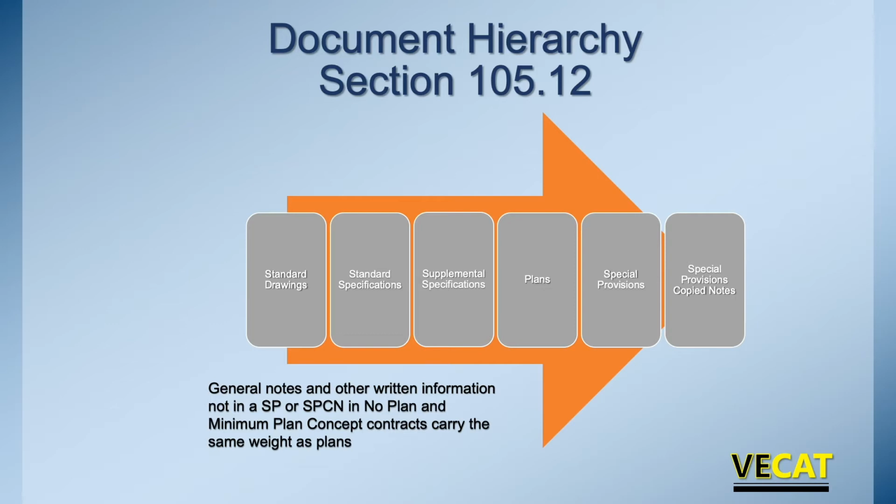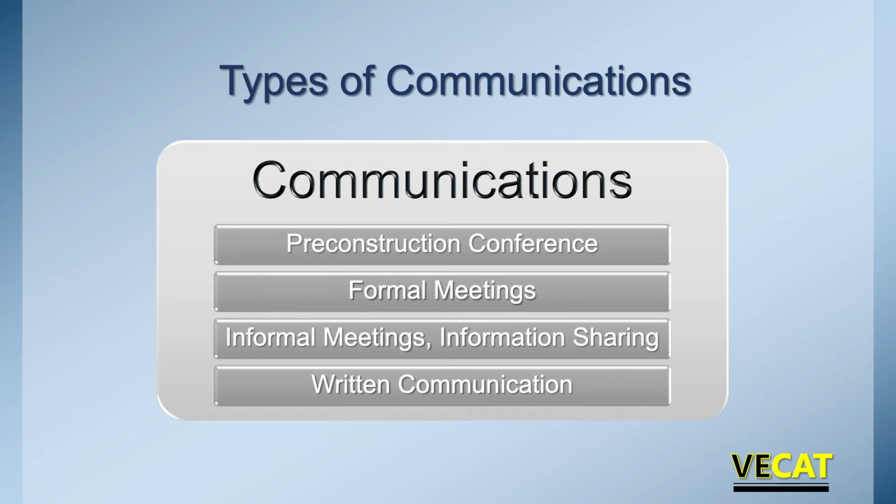If you're out in the field, many other things come into play. On projects, when we talk about communications, cold in place recycling jobs, and even some of our cold plant recycling jobs, we're doing pre-construction conferences. So we're getting together before the project starts, sitting down with the VDOT personnel, maybe the consultant personnel, the contractors, some of the subcontractors may be there, and we're going to talk about how the project goes. Do we have all the paperwork, do we have the necessary sign-offs, what's the job mix? A lot of things go into that pre-construction conference. Talk about safety and things of that nature.